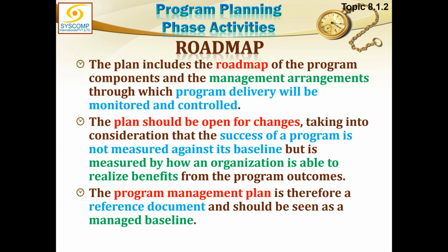The plan should be open for changes due to obvious reasons, taking into consideration that the success of a program is not measured against its baseline. Very important point. Success of a program is not measured against its baseline. It is not a project. In a project, we used to measure it against the baseline. Here, we do not measure the progress of a program through its baseline, but by how an organization is able to realize benefits.